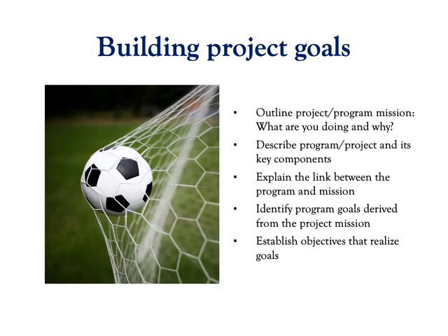How do you build project goals? Well, project goals should always flow from the project mission. So the first thing you want to do is create a mission statement for your project. What are you doing and why? This could be one or two sentences. Again, it should be very actively voiced and very specific. And then from that, how are you going to realize that mission? What are the key components of the project? What's the link between the program components and its larger mission, right? And this will help you understand what your goals are.